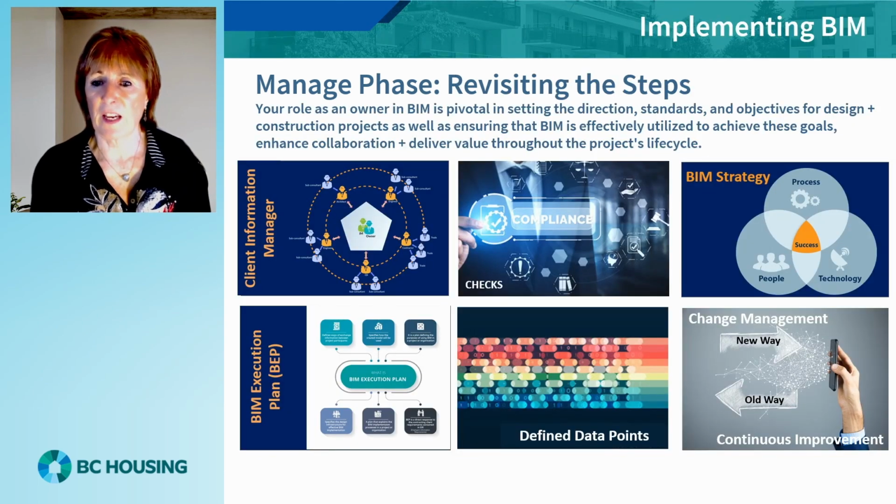During the management phase of a BIM process, it's vital that the FM team has the required expertise on their team, whether it be an internal or external consultant. This is the entity, the information manager, as defined in ISO 19650, that will undertake the quality control and will define the data checks to meet compliance.